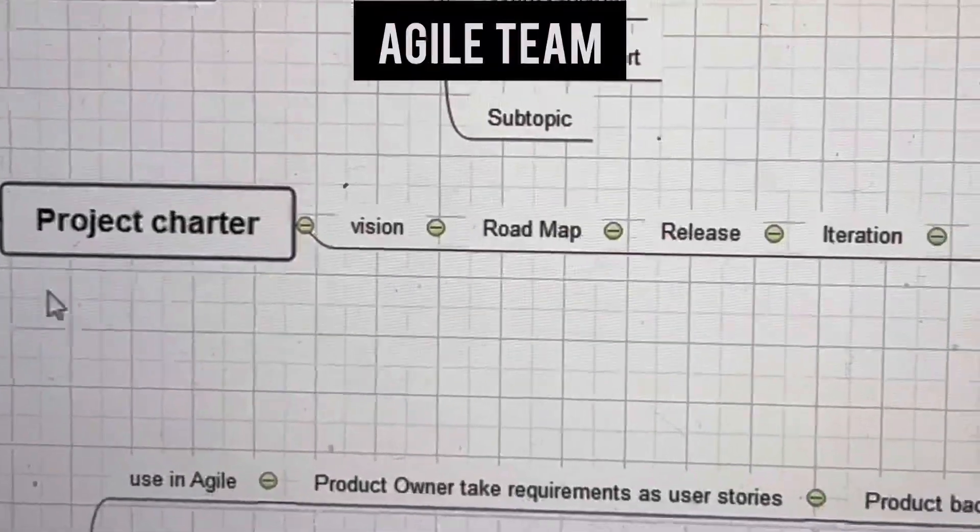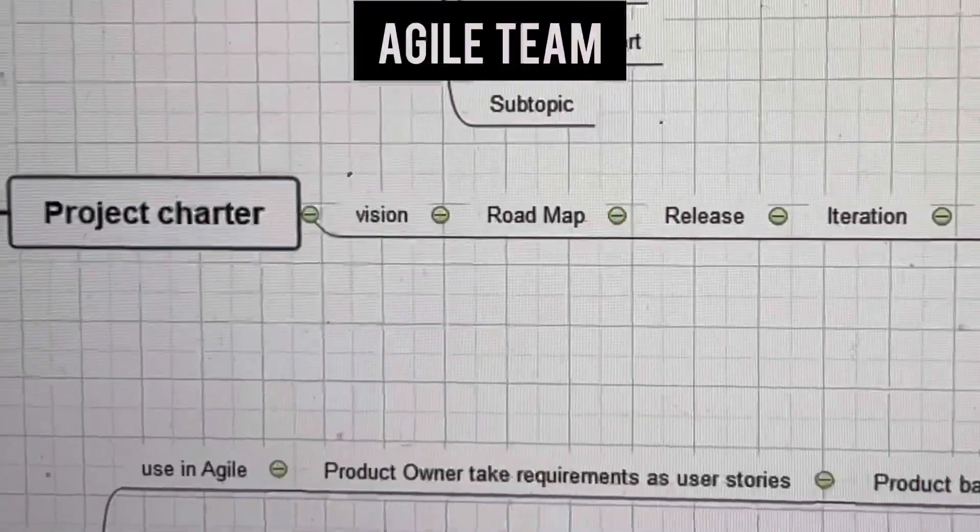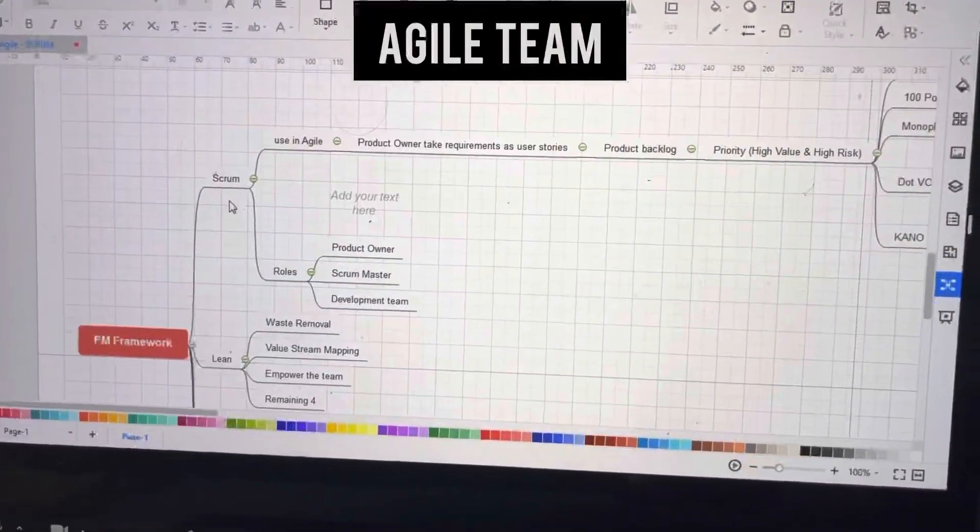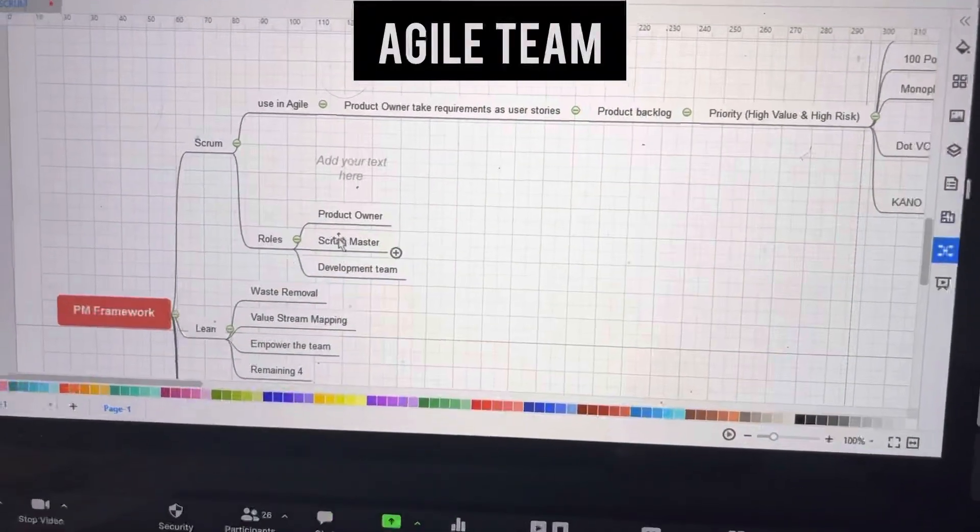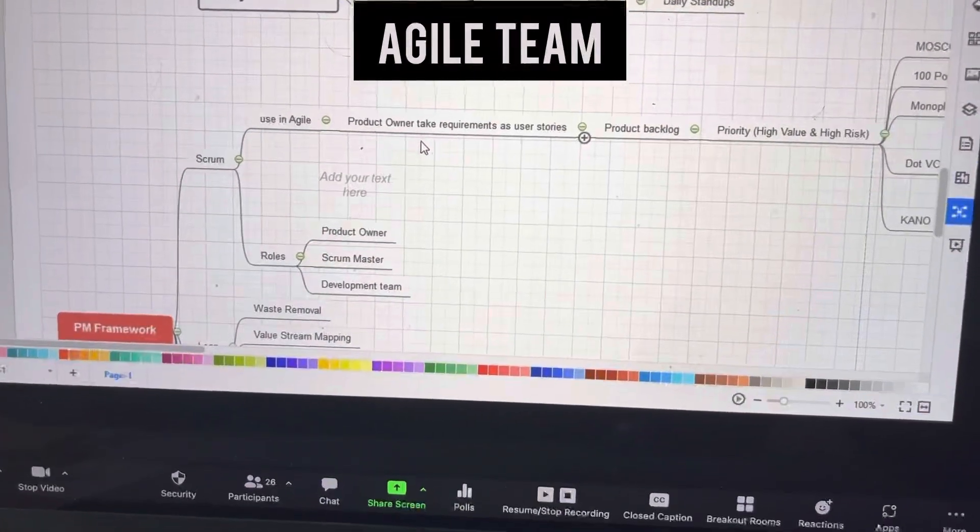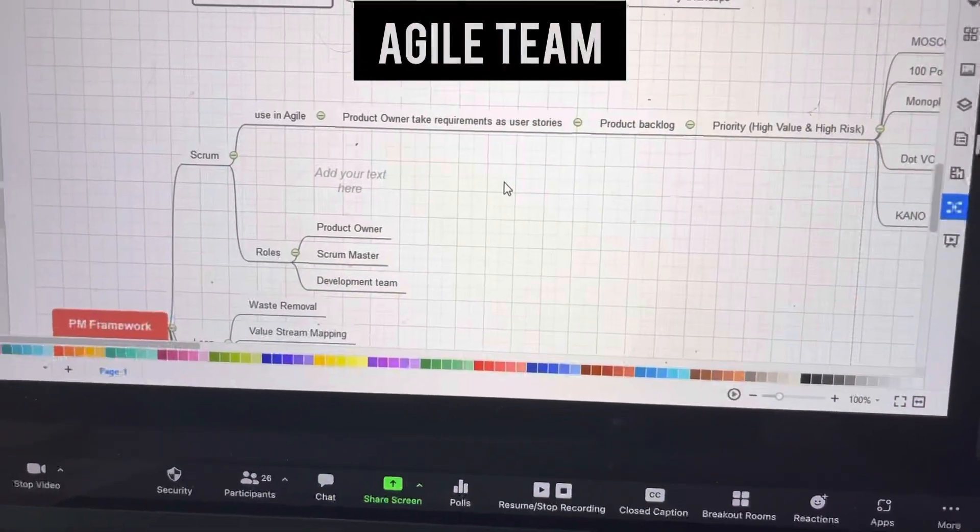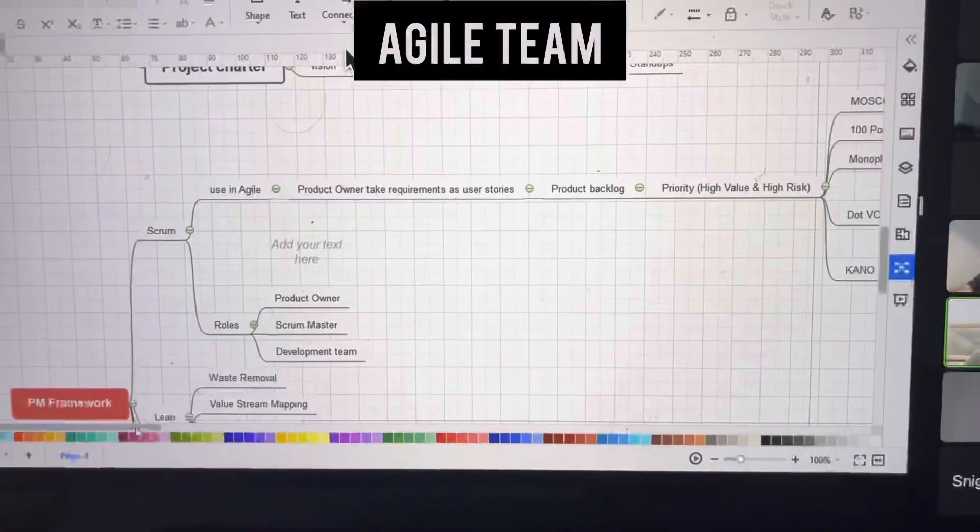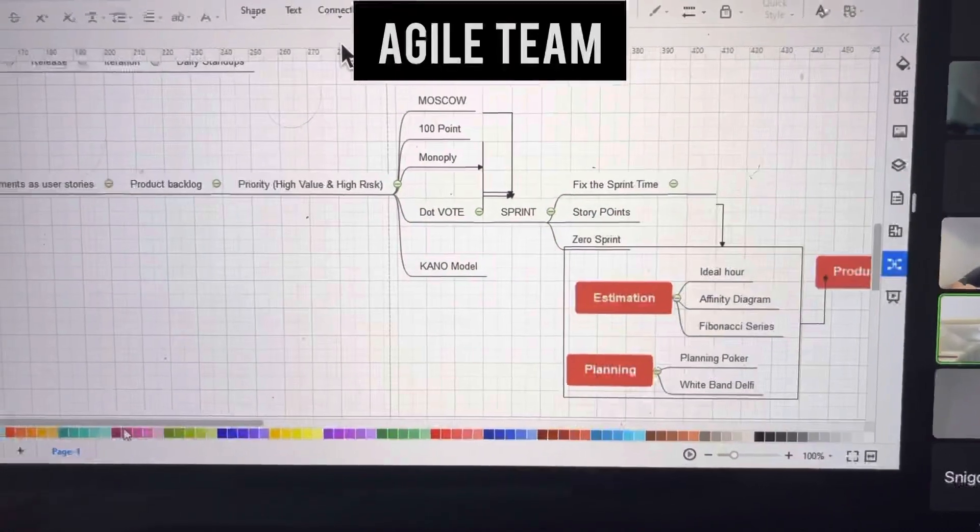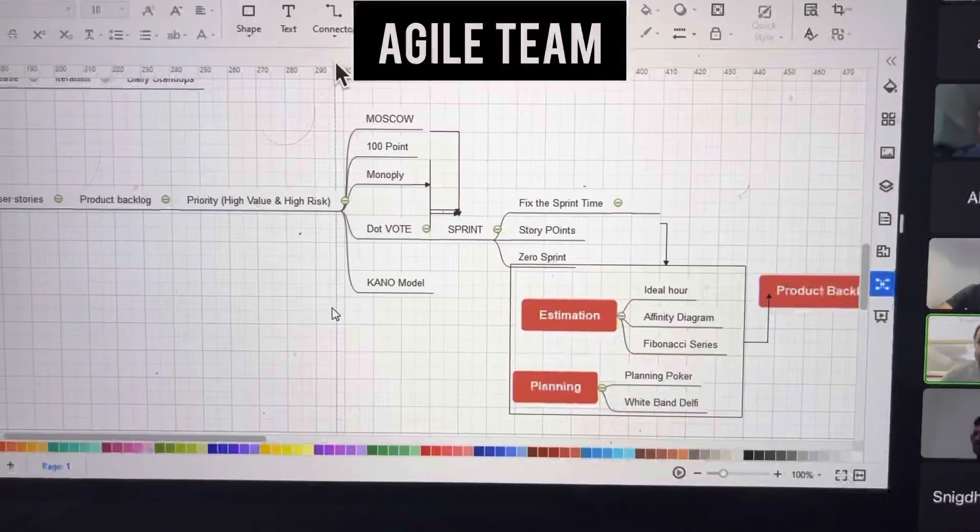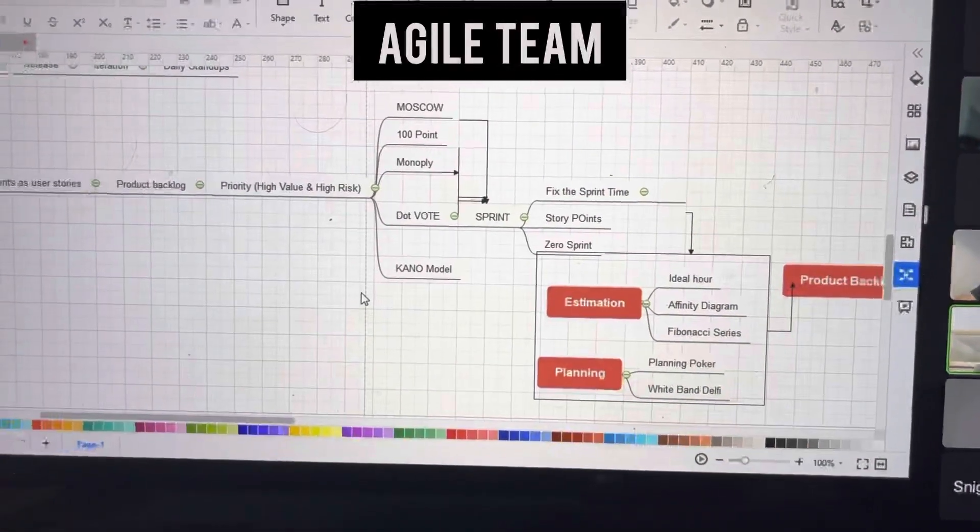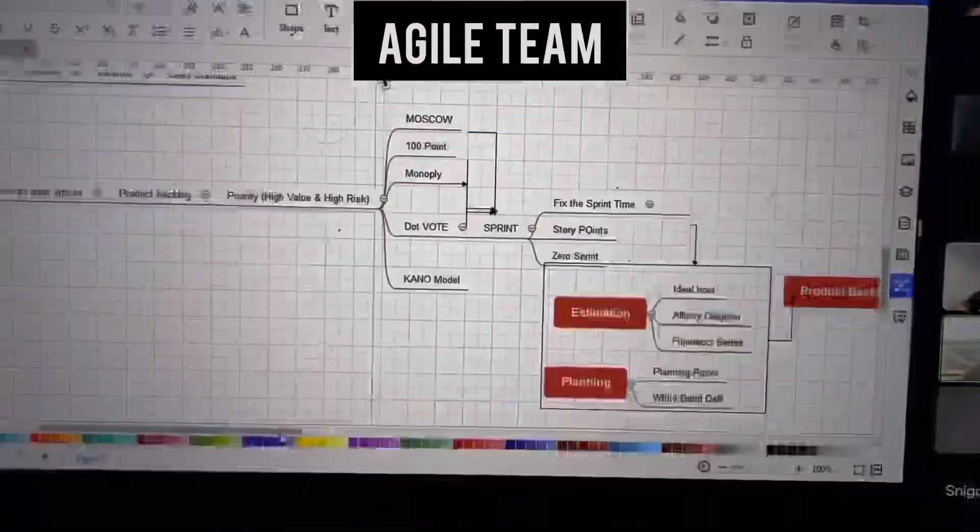Scrum is one framework used in agile. There are three roles: product owner, scrum master, and development team. We start with requirements that the product owner takes as user stories, then create the product backlog. We prioritize based on high value and high risk, using methods like MoSCoW, 100 point, monopoly, dot voting, and economic model.